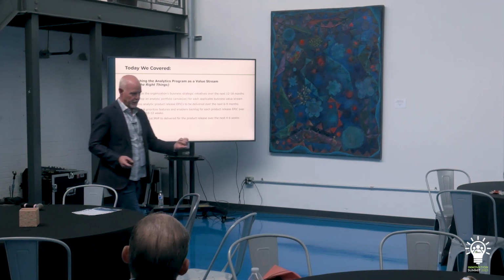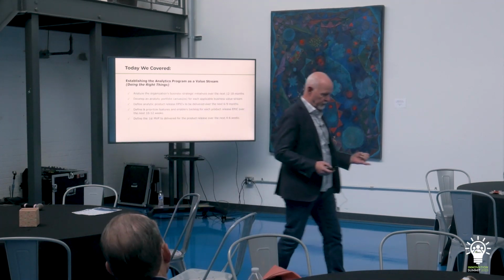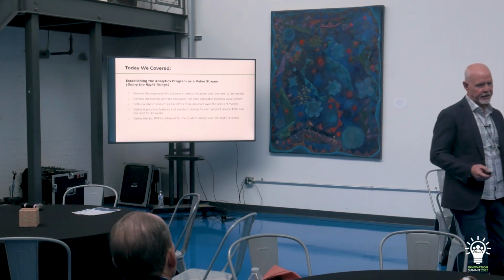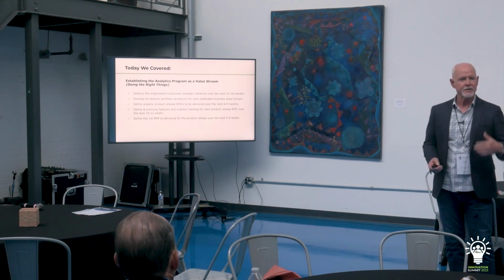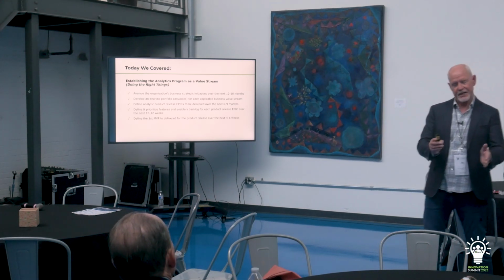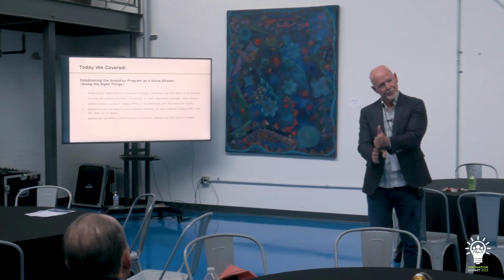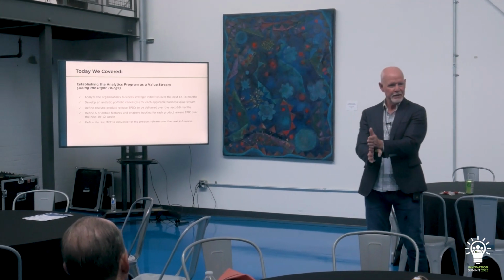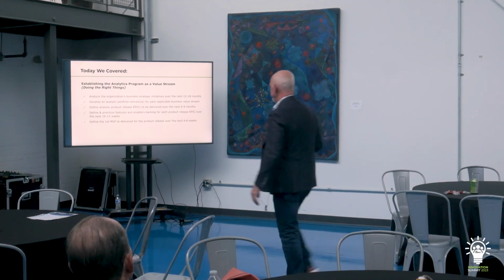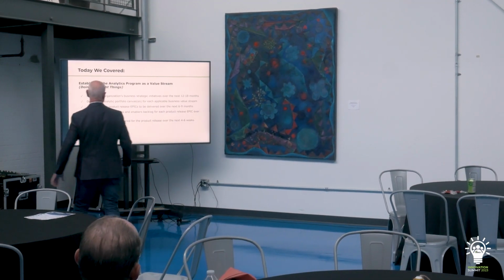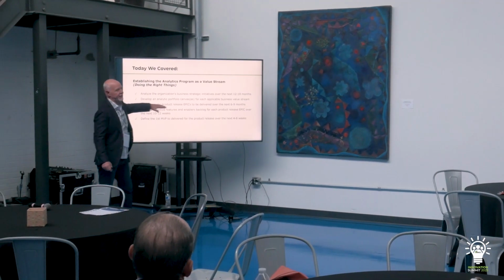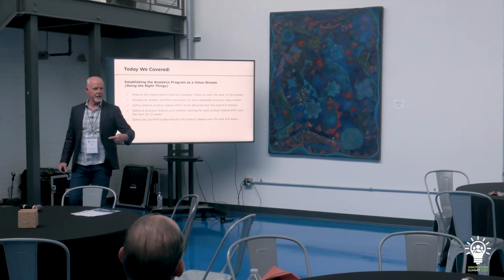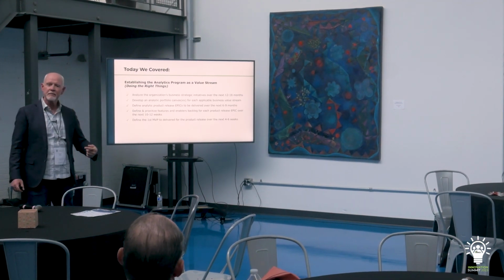Okay, so the portfolio plan, you build it with a 12 to 18 month planning horizon on it. You set up a regular cadence to visit that quarterly, which is nice because that lines up with your product release plans that are supposed to be happening quarterly, right? Then you build your product release plan. Since that has a 6 to 9 month planning horizon, you should visit the product release plan monthly, right?